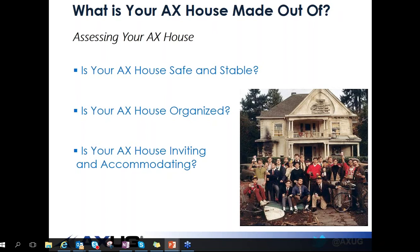But also, have you communicated this change to everybody? Have you updated your documentation? So making sure you have those processes in place. Change management and review board: how are you going to determine which changes to make? Do you have a process or a sounding board where team leaders from different areas of the company can all hear together what changes are being asked for, so that somebody doesn't make a change that impacts another group negatively downstream? Those are the types of organization aspects that we try to make sure are in place